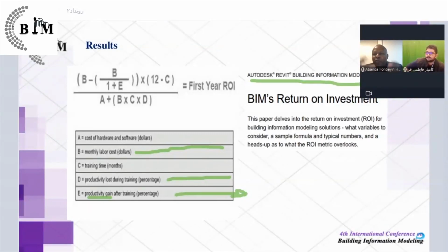Another one is if you are using a mobile phone and a CDE, as you mentioned. Without a mobile phone and without a CDE, you have to go to the site so many times to see the evolution of your project. But if you have a mobile phone with some of these apps, somebody on site can be sending you live reports, getting snapshots and sending them to you. That can reduce the number of times that you go to site.